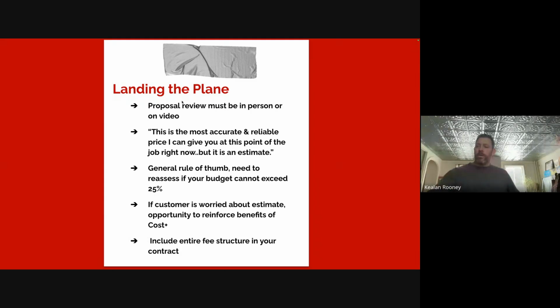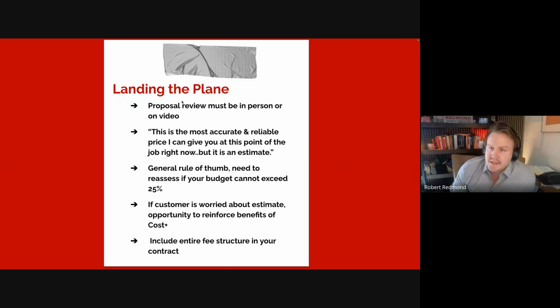Okay. And then one more question, like cost plus, it almost seems like it's kind of time and material. So how do you explain the difference between time and material and cost plus? So the way I like to frame it is, cost plus is more of a margin approach, and time and material is more of a markup approach. There are some very similar mechanics, right? But typically with time and material, you are adding a markup. With cost plus, it's a margin basis.